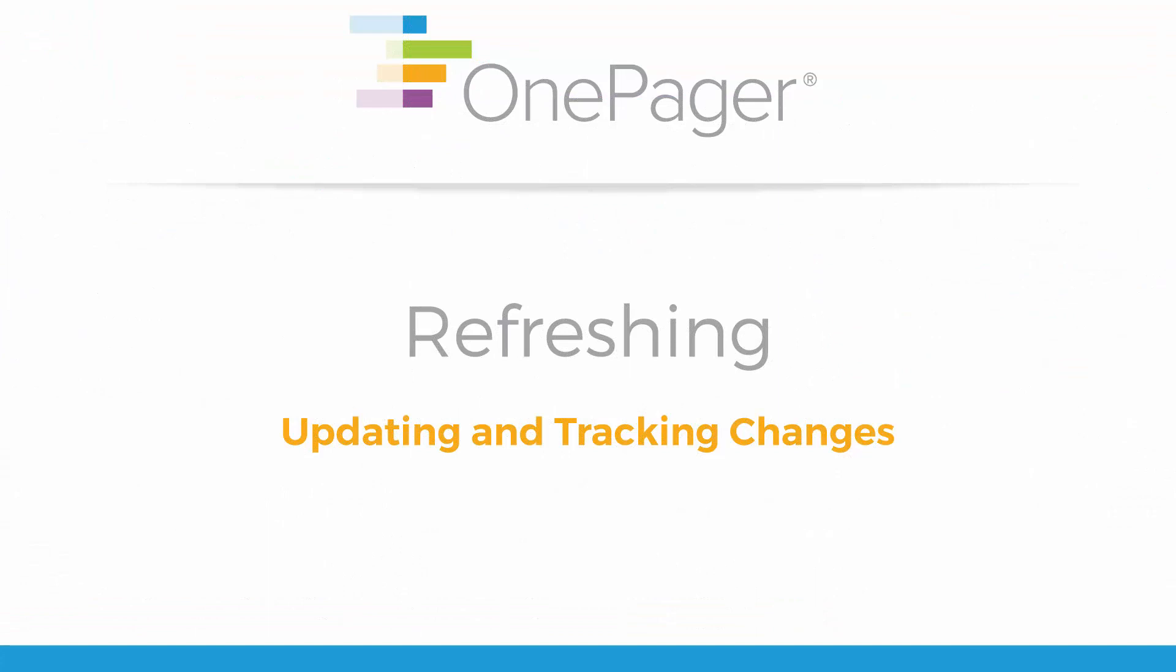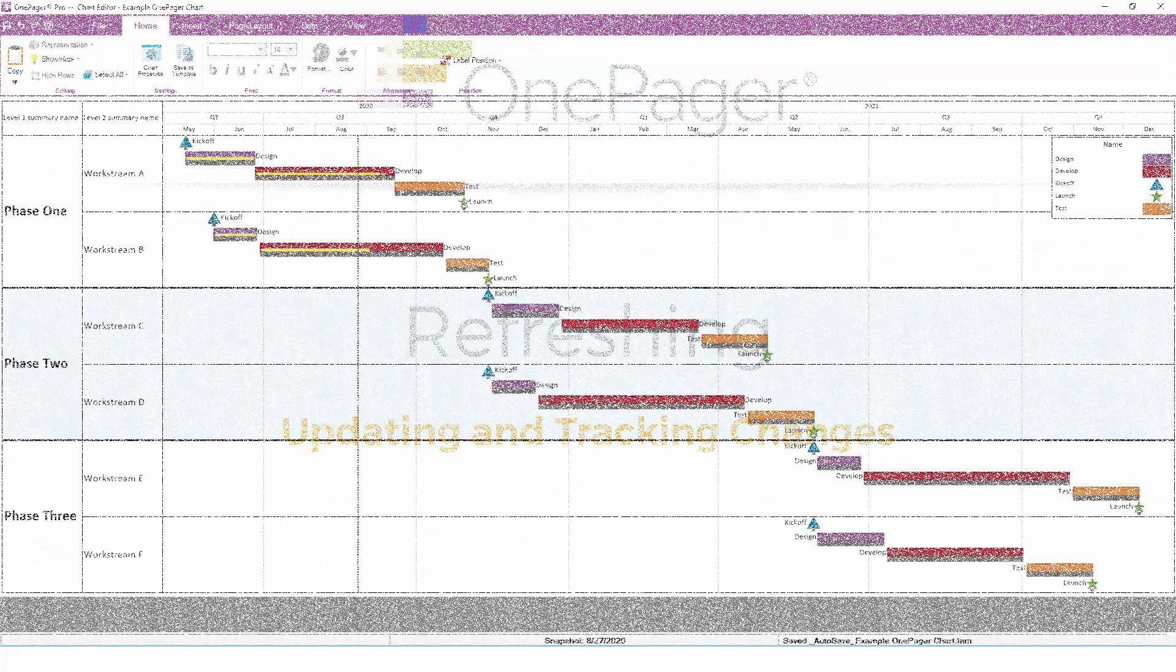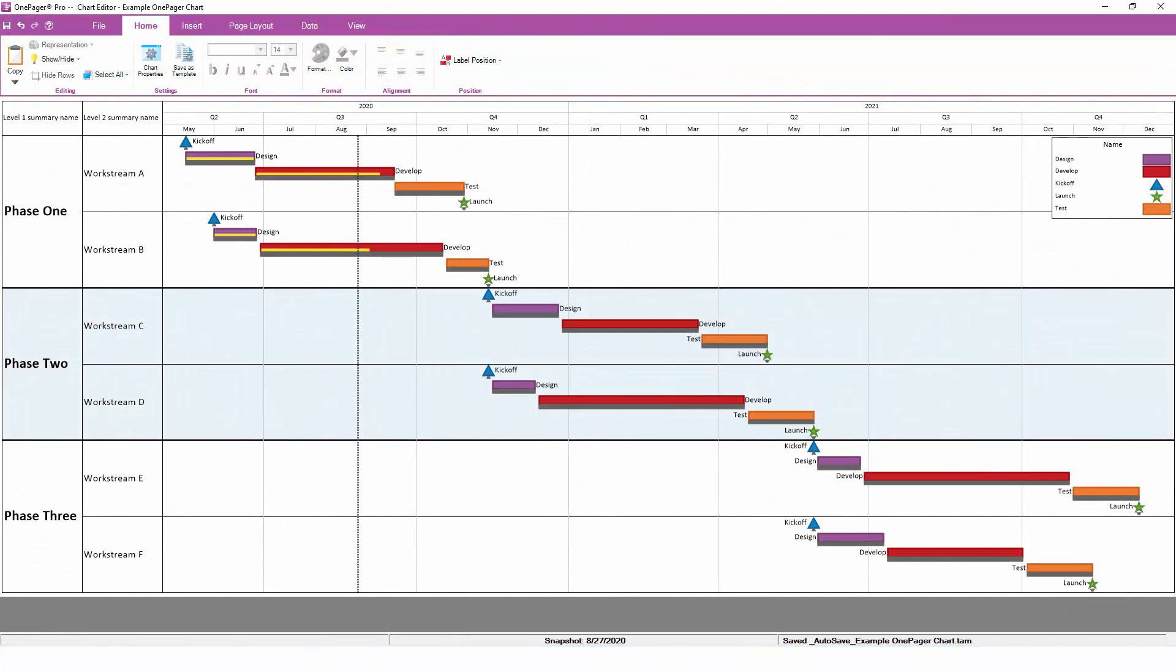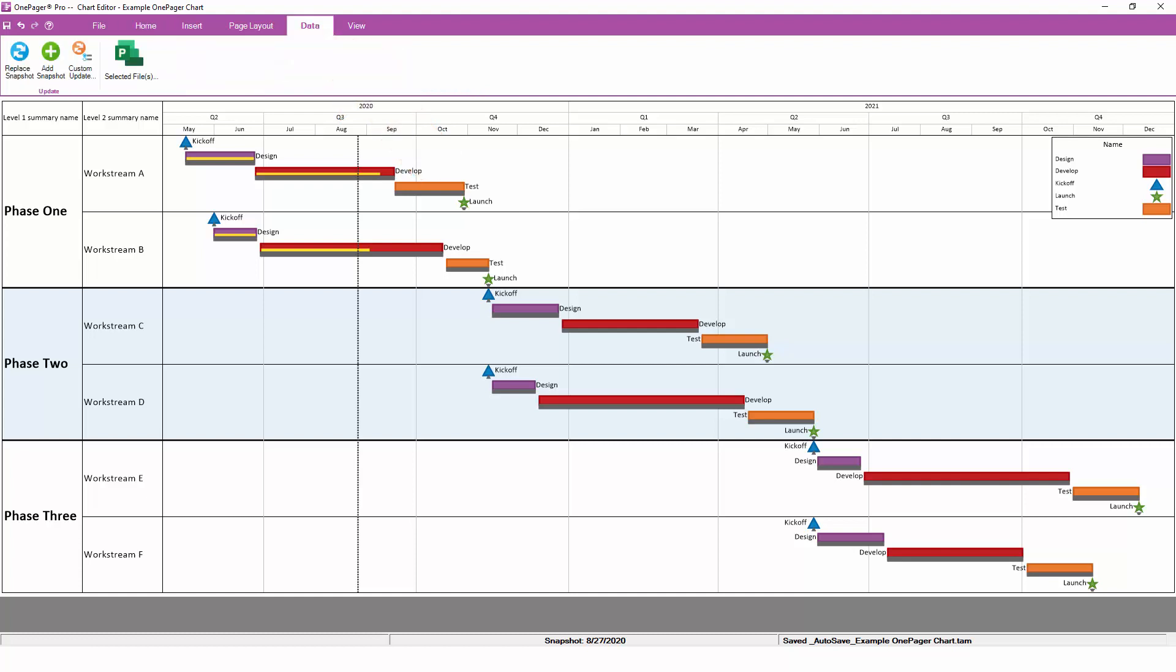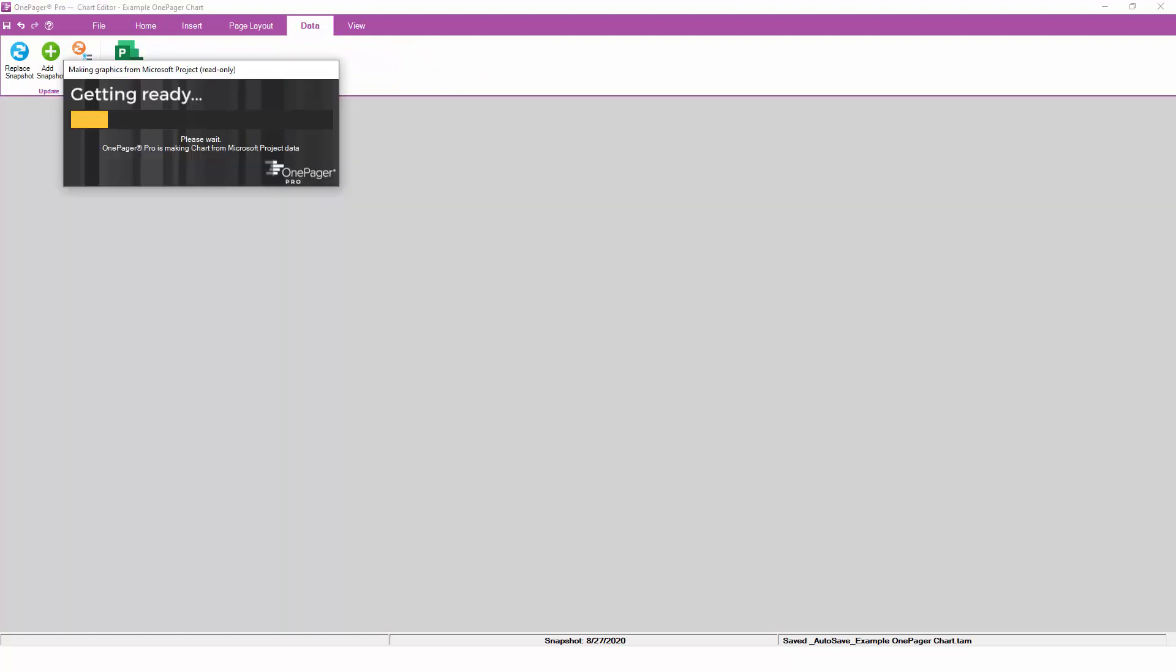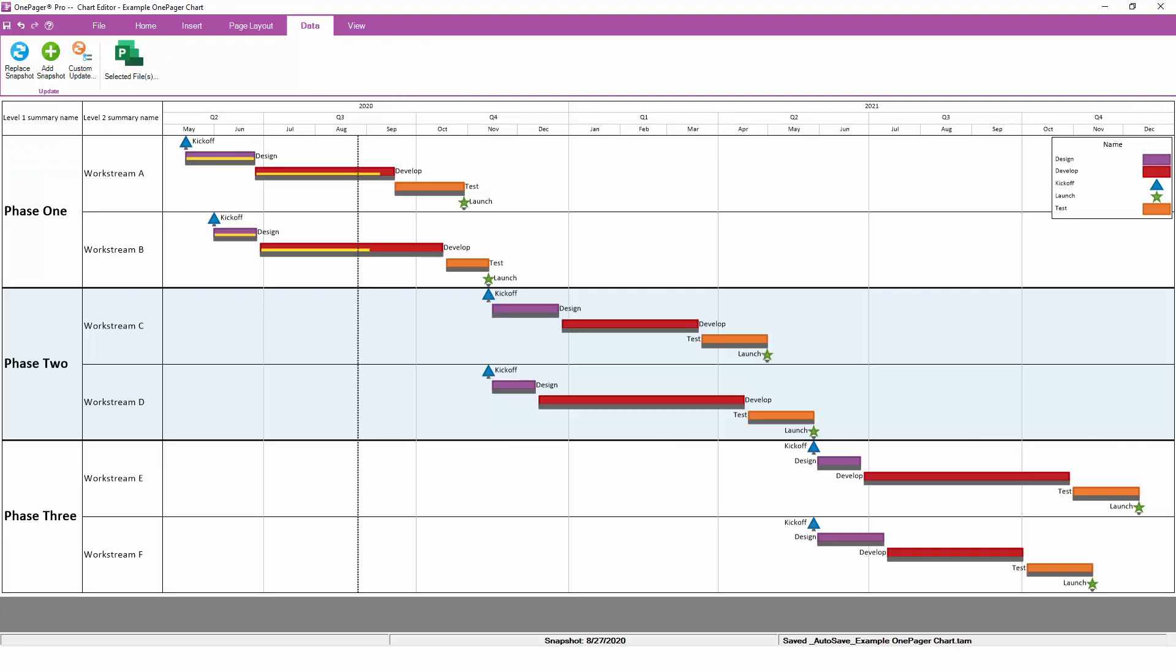Your OnePager chart is a living document. As you make changes to your project plan, you can refresh your chart to get a real-time update or even track changes over time. If you've just built your OnePager chart and you've made some adjustments to your project plan, you can pull these updates into OnePager by going to the Data tab and clicking the Replace Snapshot button. This will re-import your information from Microsoft Project while preserving any formatting that you've already established in the chart.